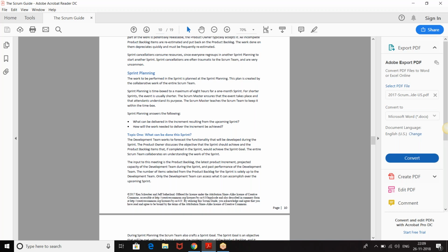Is whatever is in the backlog not part of the sprint? I mean, they have to move it to the current sprint, right? Yes, but let's say you have 250 items. You cannot move all 250 items into a sprint backlog, so you will break it up. You will decide that you want the login register feature for this sprint. Let's say there is one product backlog item you have created called register using a Google account. That is product backlog item one, on the top of the list.